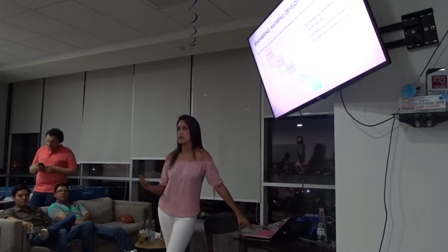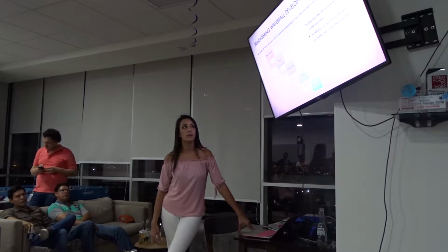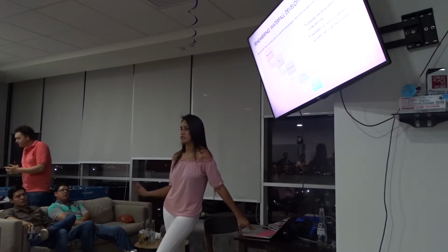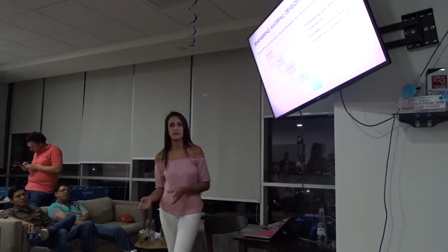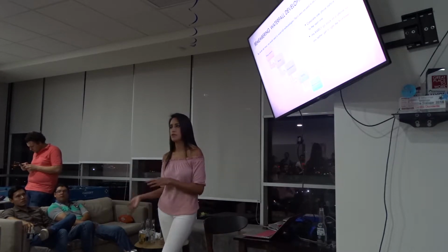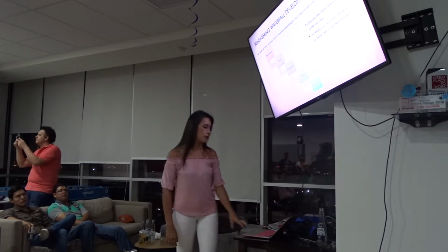Okay, so if we start to remember a little bit about this waterfall development, we all know that in order to move to another stage, we have to finish the first one that we're working on. And we really never get back to a previous stage. You start with requirements, and you move on to design, then you finish that, you move on to development. You never go back again and do another design, or go back and do another requirement.